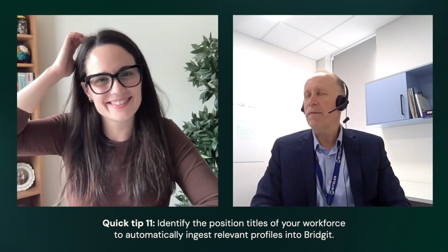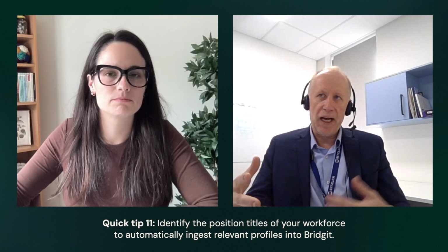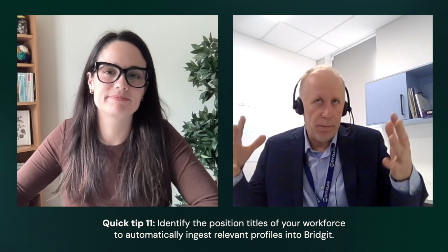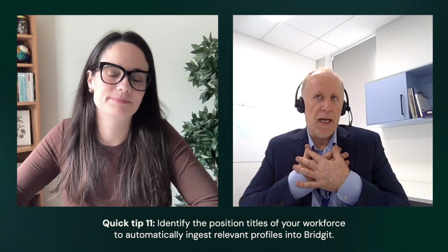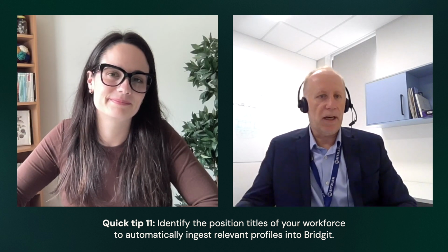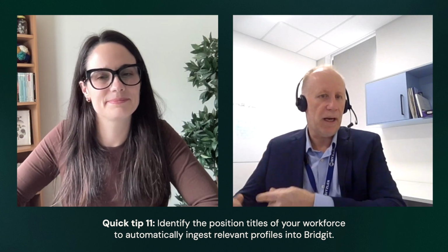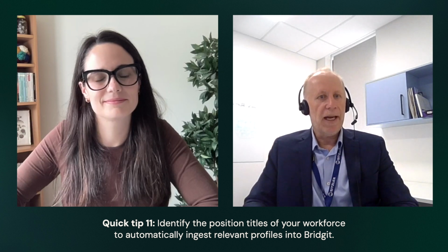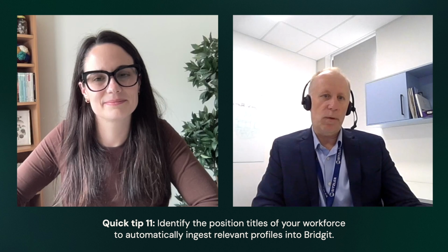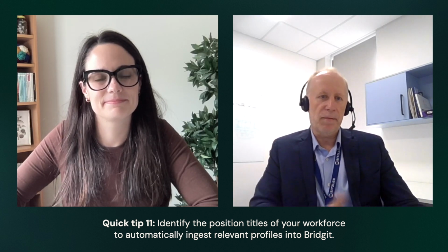The other one is position titles. We've set up a system within the HR and Bridgit to identify the position titles that we call somebody, like myself, senior business analyst. It will look at that and say, well, that role isn't a role that exists in Bridgit, so none of my details will come across. So there's some smarts there now. So if we get a new person come in and their role is a project engineer, it will seamlessly identify that and say, hey, that's a role that would be included within your scheduling for your projects. So let's bring that profile across, populate it, bring it in.